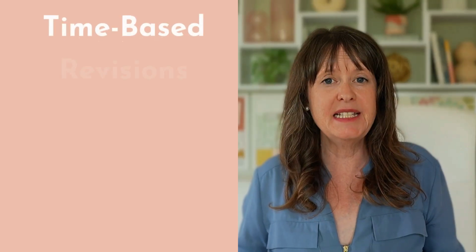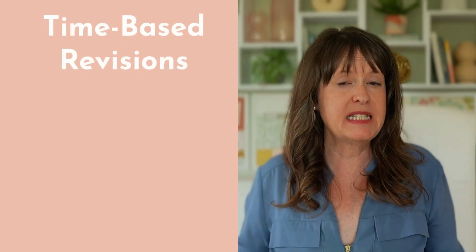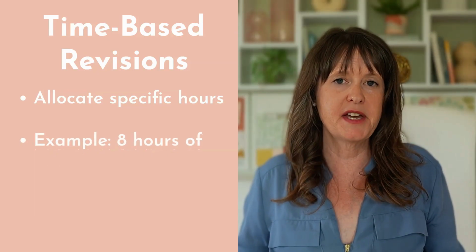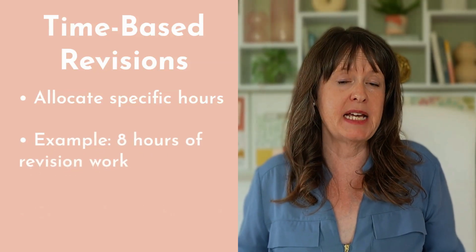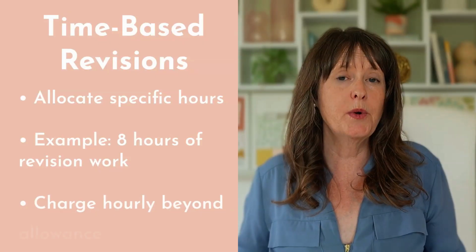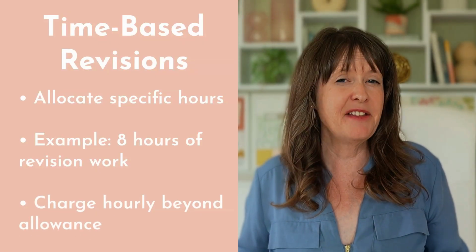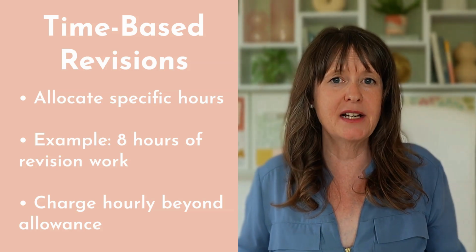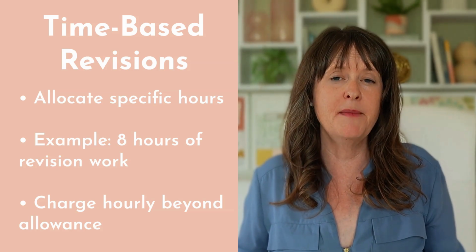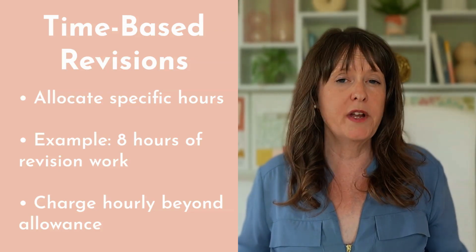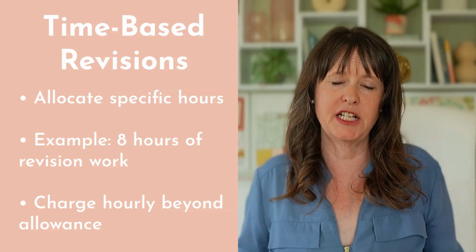Now a third option is time-based revisions. So you simply allocate specific hours for revision work. So something like the project includes up to 8 hours of revision work with additional requests beyond that charged at your hourly rate. Now this approach is really good because it helps clients to understand the value of your time, and it gives you flexibility to handle different types of changes without all of that complex categorization going on.